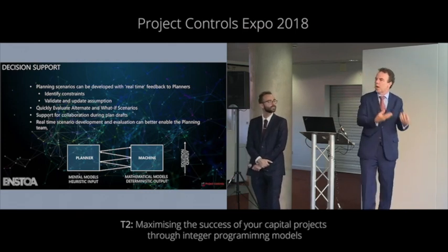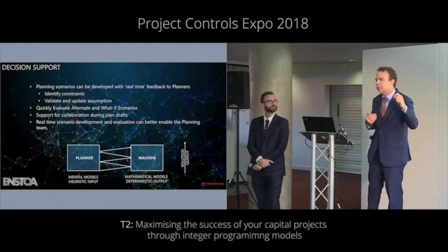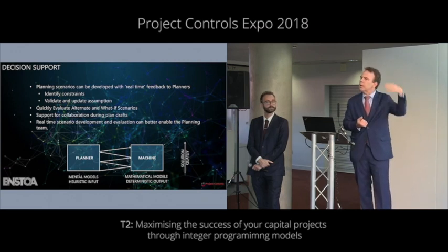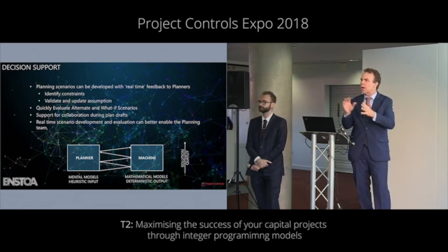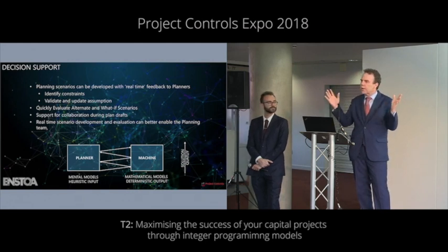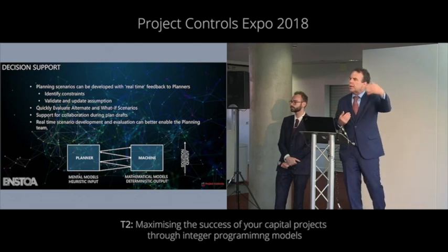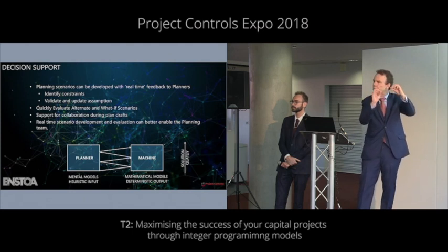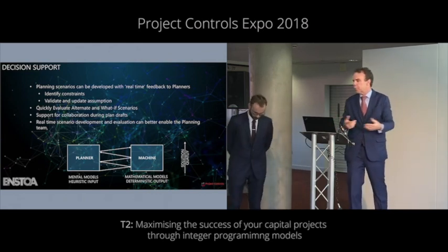We want to be able to provide options and alternatives. Every time the planner makes a decision like that, the planner may say, okay, I like where this project's at, I like where that one's at. Those are getting locked in. Those become additional layers of constraints in our model. When they want to push something around earlier, start later, et cetera, these help refine the algorithm. Once the planner has the prioritized projects locked in, we rerun, and then we can see the best way to schedule the remainder of the projects.